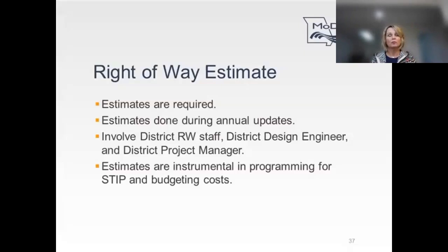For stage 1, we consider that the planning phase. A conceptual right-of-way cost estimate should be prepared by the right-of-way staff, which involves a market analysis conducted by the staff appraiser who reviews the location of the project and collects market data for real estate costs. This stage is prior to the project being included in the STIP for construction and during the original scoping early on. Stage 2 is the programming phase.